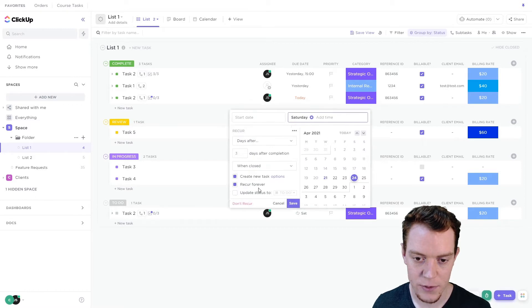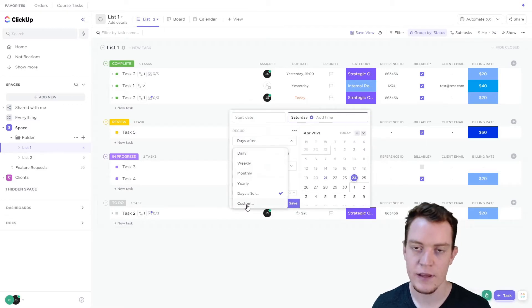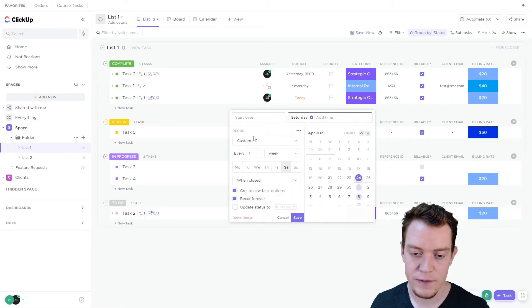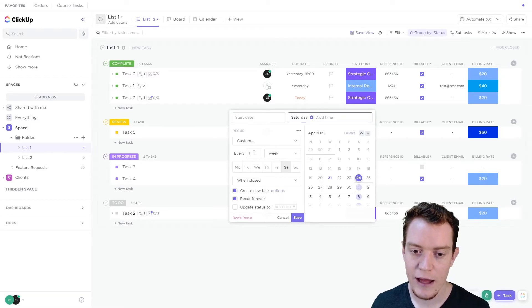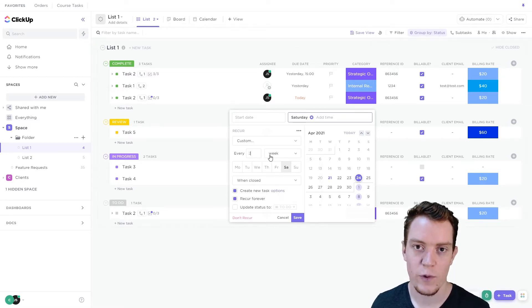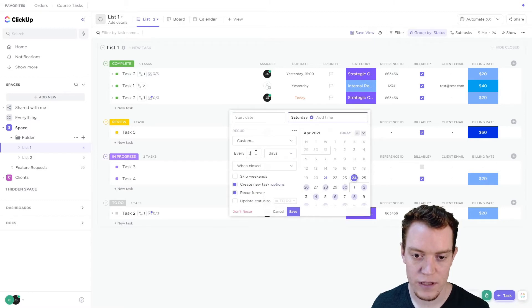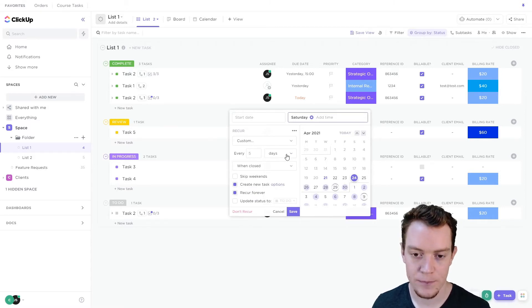The next option is 'Custom,' and this is for everything else. You can choose day, week, month, or year, and you can do multiple weeks — so once every two weeks, or once every three days or five days or whatever you need.